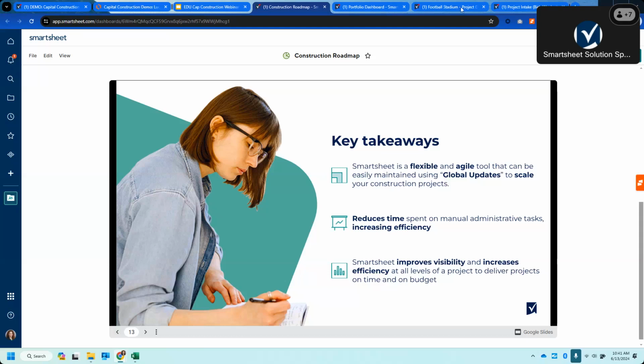Yeah, thanks, Anne. From a control center perspective, in most higher education institutions that our firm works with, we know that there are usually different processes for varying project types, be they larger capital projects, that might mainly use P6 or Primavera for schedule analysis, monthly updates and things like that, versus smaller maintenance or major maintenance projects that might use Microsoft Project or even a schedule built within Smartsheet. Because they need more rapidly deployed elements, and they might even be working within different groups within the overall university organization, to work on the different project types.